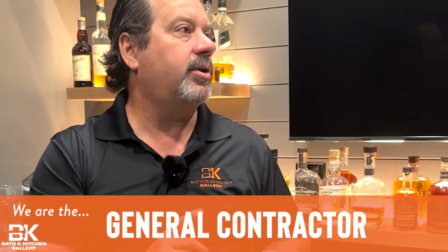Another point of friction in most remodeling projects is subcontractors. Do you have subcontractors in your projects? Yes. And the plumber, yeah. Most people, the problem with subcontractors is just the scheduling, right? So we have gone the route where we are the general contractor, but we're also the plumbing contractor. We're also the licensed electrical contractor. We're trying to get as few subs in the remodeling project as possible, because it makes a smoother job.